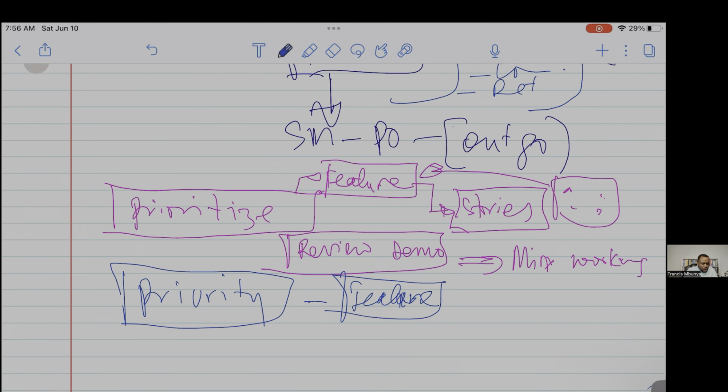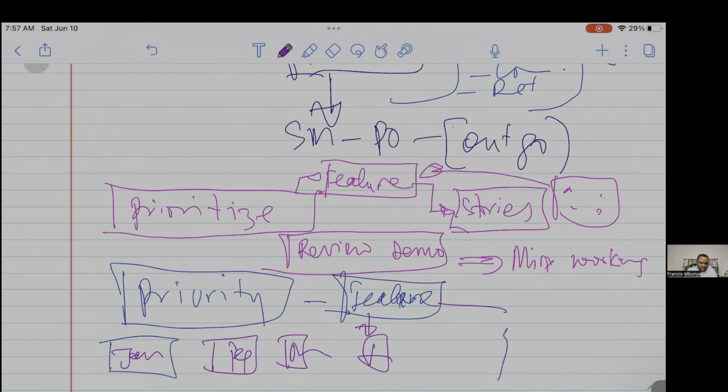So when we have this priority, it can now help us to start thinking about what date these features need to go out. We can start thinking about January, February, March, April, and we start tacking on, okay, this can go out by this period. This can go out by this period. Now in SAFe, this is what we call what? They are also main features, but when we accomplish a major feature that can get the customer start working, this is also referred to as a milestone. Yes, we have done this. So the customer is glad.